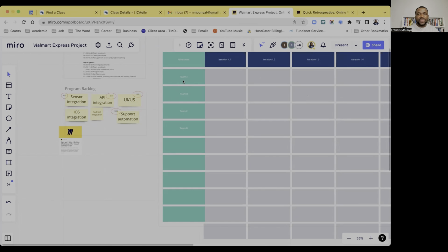So based on this, if you look at, let's say, UI UX, this is where we make a decision on how many people are going to be part of the team. So let's say you can have a team of 10 implementing this, given that we want to complete this within one PI. We'll put up a contract of, let's say, about 4 months or 6 months for UI UX, because we want them to come in and complete this work on time. So you realize that within that period, we need to bring in these people. And this also explains why, when your contract has ended, you should understand that your contract has ended. Maybe they hire you as a Scrum Master specifically for the UI UX team, and then their work is done.